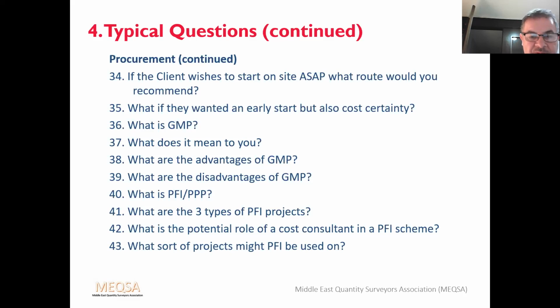What sort of projects might PFI be used on? Well, it's recommended where it offers clear value for money. Now, in certain parts of the world, for instance the UK, it's generally been regarded as not value for money. It's almost like a mortgage, in that the private sector builds something and then leases it back to the public sector for say 25 years, like a school. And if you add up the figures at the end of 25 years, it's far more expensive than it would have been to build and maintain themselves.